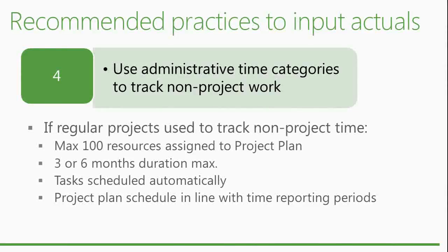All right, the next one is to use administrative time categories to track non-project work. So this is the most flexible and easier way to deal with this. If it's not possible because you don't want to use a timesheet, that's another thing. So in this case, you could use a regular project to track the non-project time, but you have to keep in mind some constraints there.